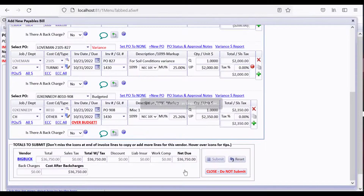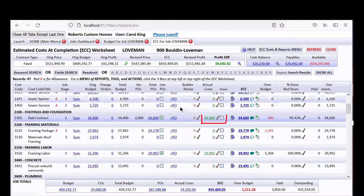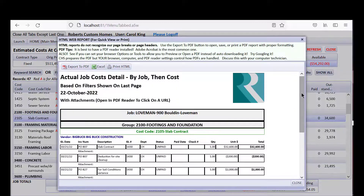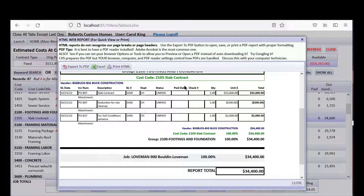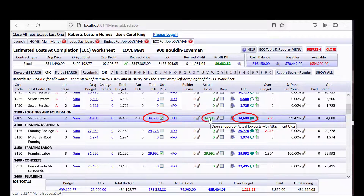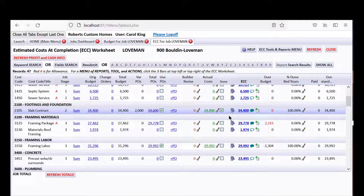Now that we posted those bills as unpaid, I reopened the Estimated Cost at Completion worksheet and voila — here they are showing up under actual costs. I don't have to do anything else; CHS just brings those in. I can drill down to see the detail behind those costs, and I can see they are currently unpaid. I can see we took away $200. I'd like to change the estimated cost at completion to be the same as the actual cost — I'll check-mark that, and now we're not showing over anymore.